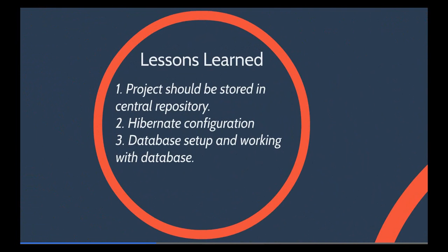Lessons learned from our project. Our complete project was done on one base machine, which made each individual in the team wait for the machine to update their progress, which was a waste of time. So we came to know our mistakes, and we are going to overcome this mistake in our future projects by saving the whole project and its updates in a central repository.